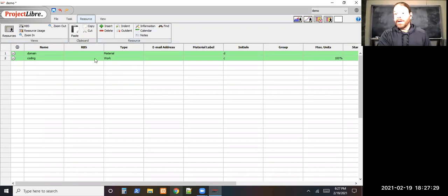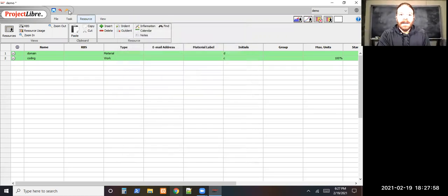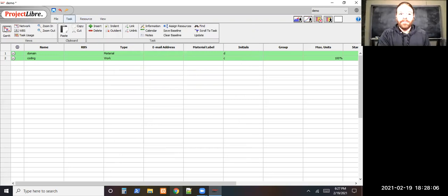Yeah, and then color coding to show that both of those resources are being applied in the project, and all the thinking and scheduling and budgeting, that sort of stuff. You pull up a calendar and set what days are working days, right? Like take Monday off the working calendar so that all the schedules adjust and things like that. I pointed out that the people that developed this software have a 12-minute YouTube video. It'll be helpful to see all that.